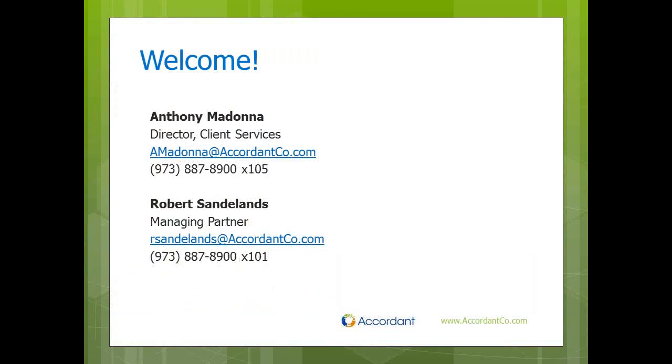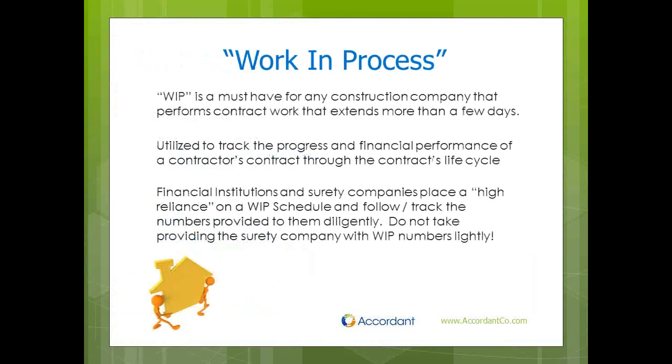Accordant. So today's topic that we selected was work in process. And the question is, why is WIP so important? Well, WIP is a must-have for any construction company that performs contract work that extends more than a few days. It's utilized to track the progress and the financial performance of a contractor's contract through the contractor's life cycle. Many financial institutions and surety companies place a high reliance on this WIP schedule and follow and track the numbers provided to them diligently. It's very important not to take these numbers lightly that you provide to your surety companies. This is a very important vehicle that most companies use to track the profitability of jobs.